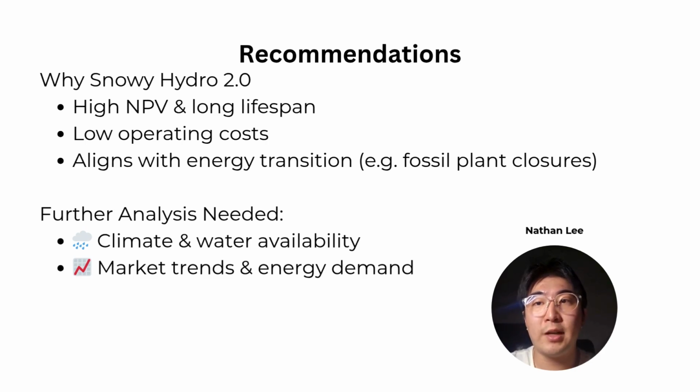Based on the financial evaluation, sensitivity analysis, and risk assessment, alternative A, the pumped hydro expansion, is recommended. Although it requires a higher upfront investment, it offers a significantly higher net present value, lower long-term costs, and a 50-year operational life, making it more financially sustainable. In contrast, battery storage faces greater uncertainty in cost and performance over time.